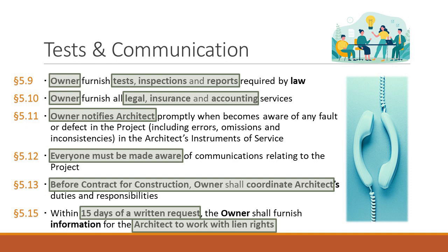It went fine. The last part of this provision, it talks about communication, and this is kind of more the traditional. Communications with the architect's consultants shall be through the architect, meaning, if the owner and the contractor are talking about the electrical lighting system without the architect, the owner has the obligation to tell the architect about that. But the owner cannot talk to the electrical engineer. That is one of the architect's consultants. So to get the information to the electrical engineer, the owner needs to only communicate it to the architect.